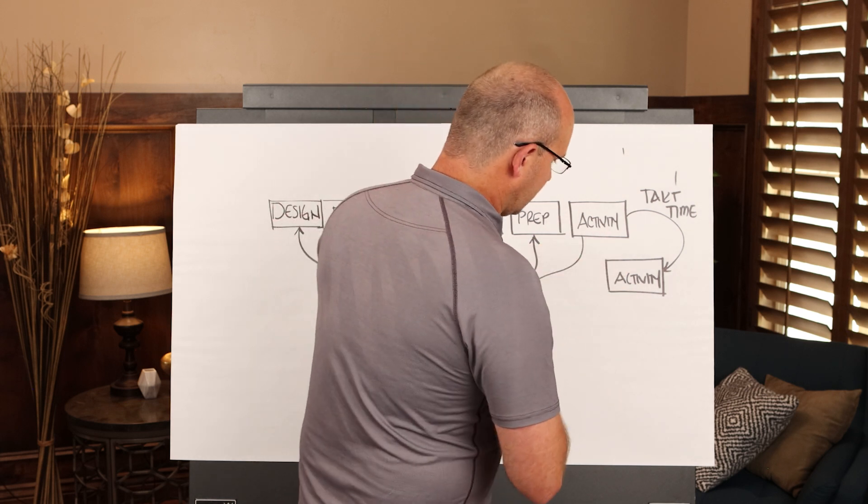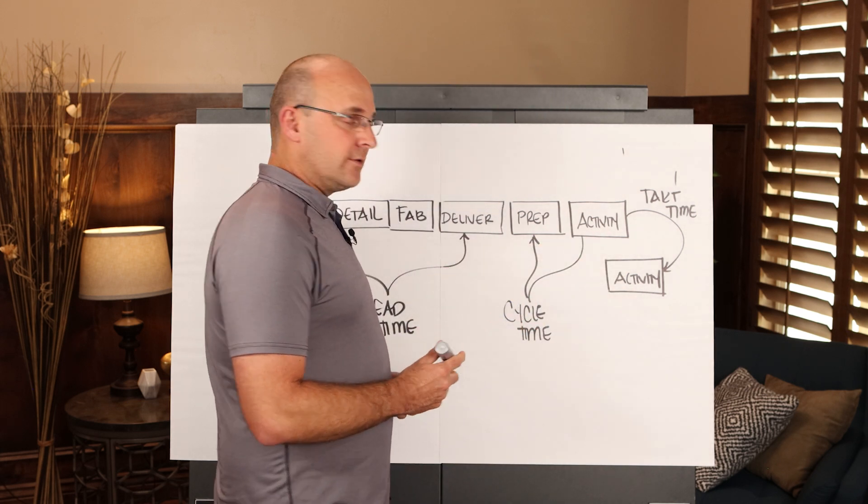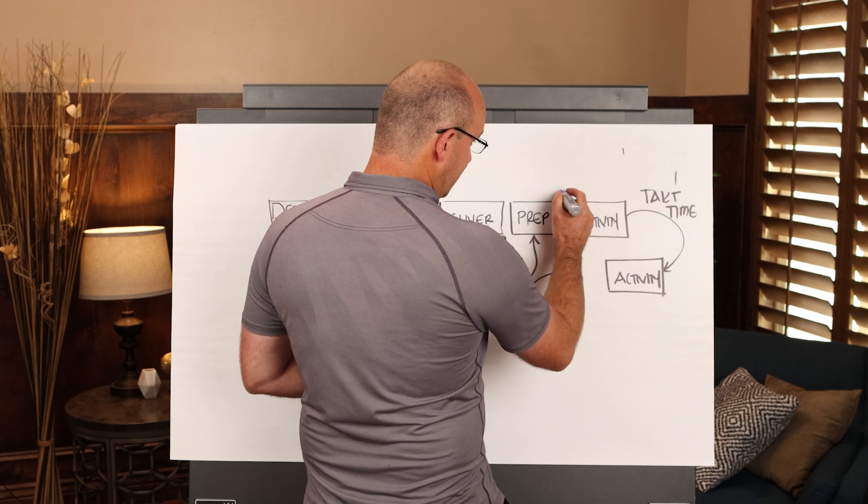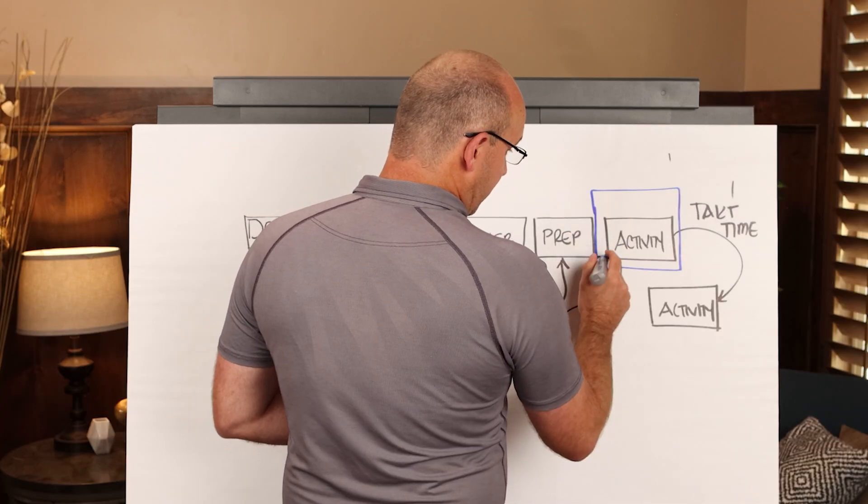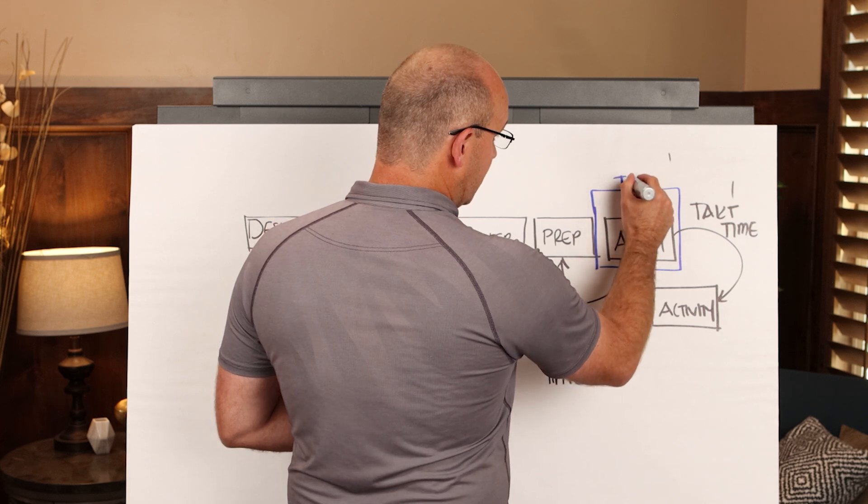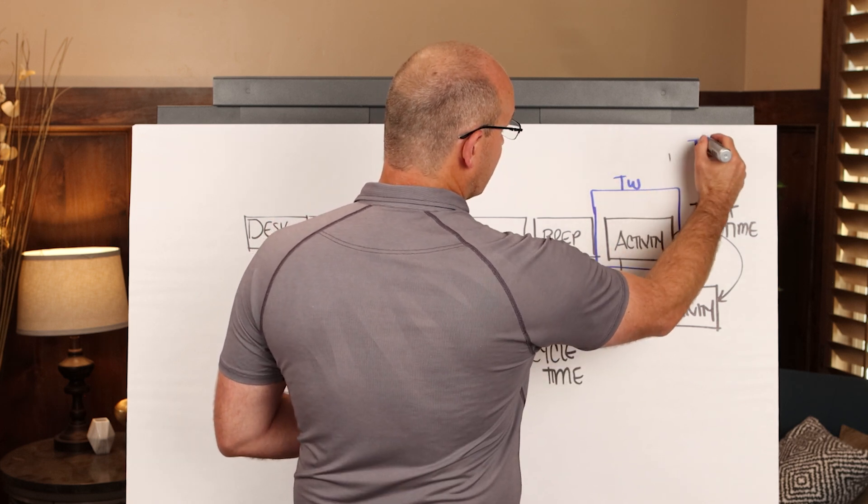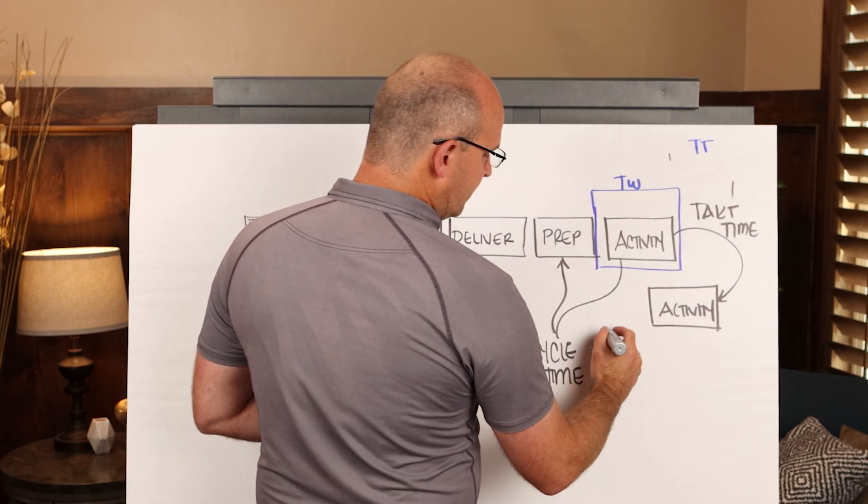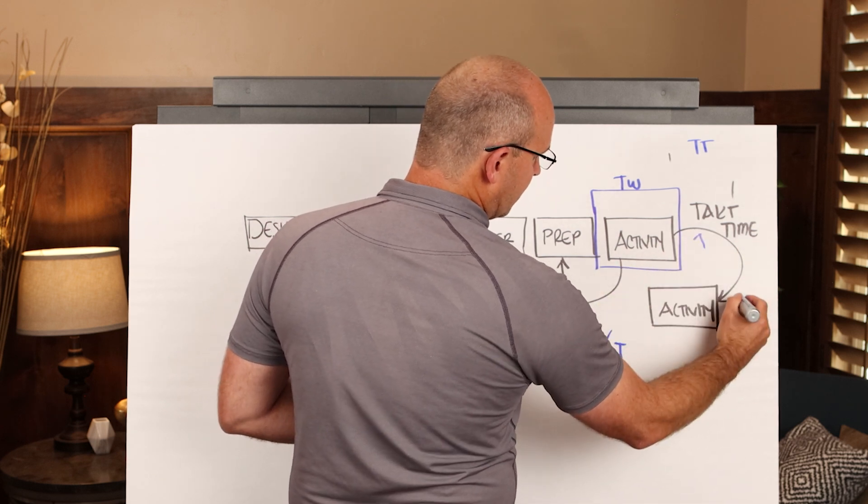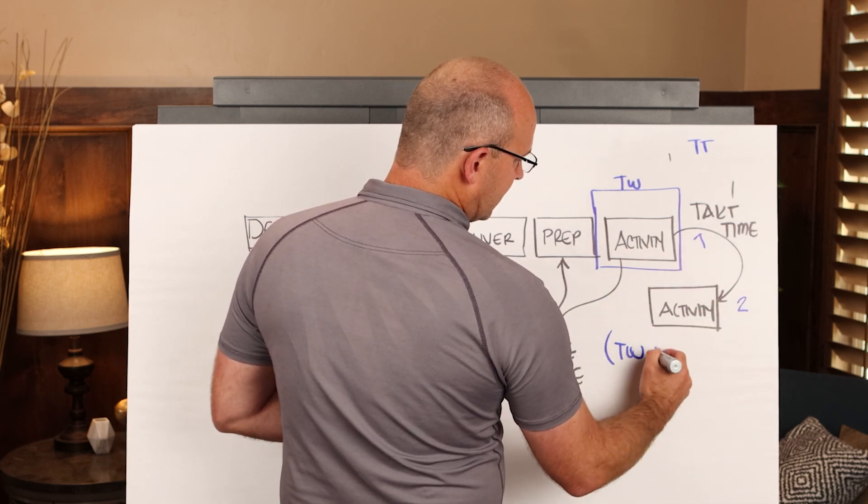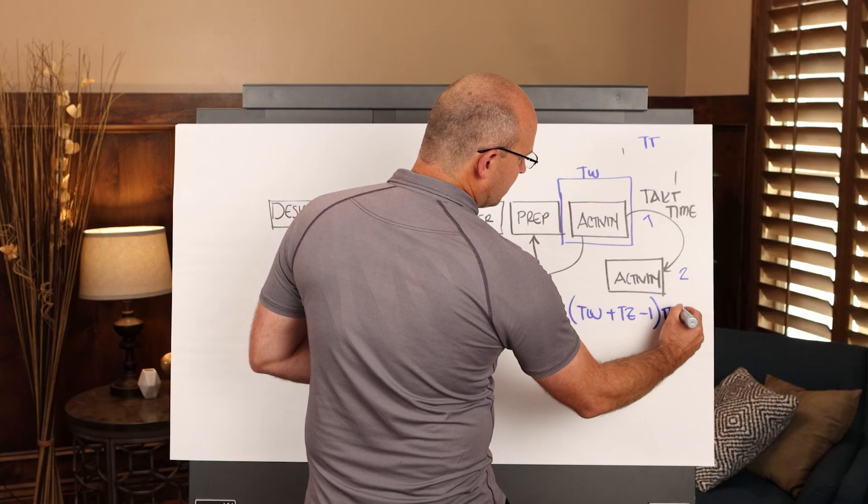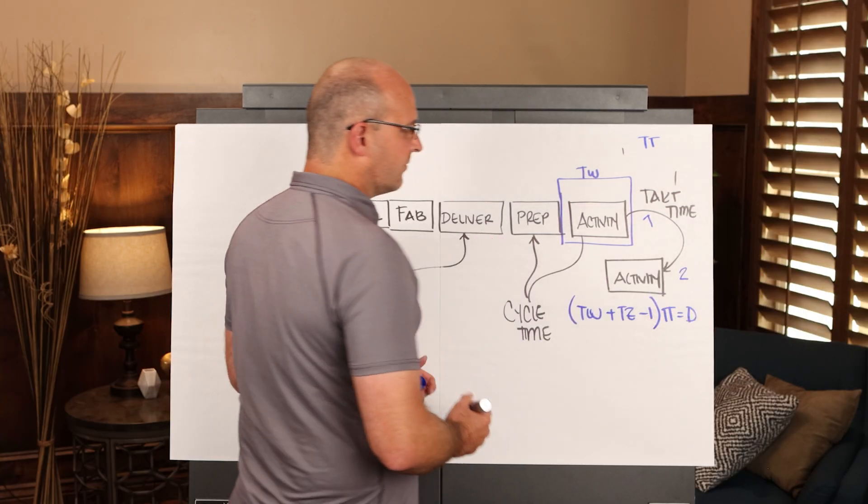So first of all, the tack time. I've explained in other videos, and I'll do it again, that if you consider the activity here or the work package within a tacked wagon, and this is called a tacked wagon, and you have your tack time, you can use the formula, and these are zones, so this would be zone one and two, tacked wagons plus tacked zones minus one multiplied by the tack time equals the overall duration.